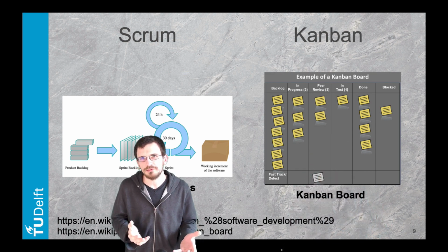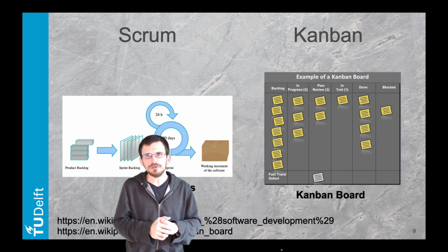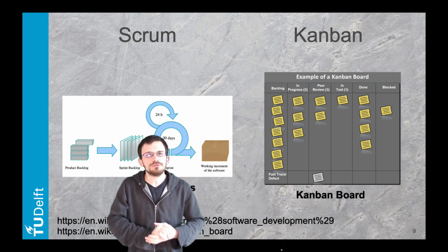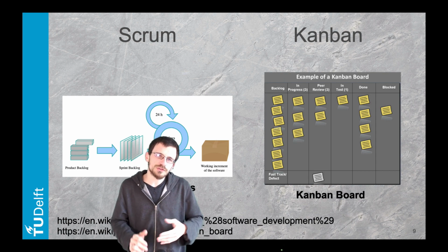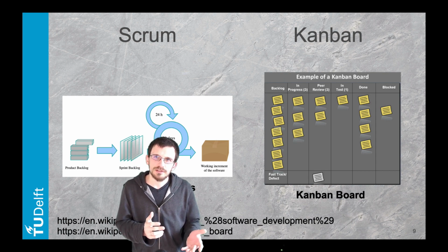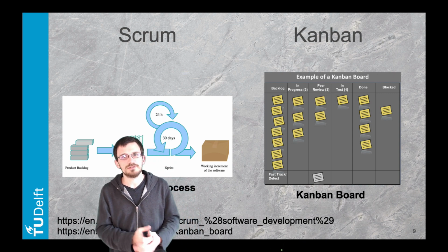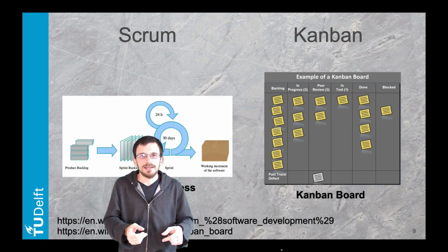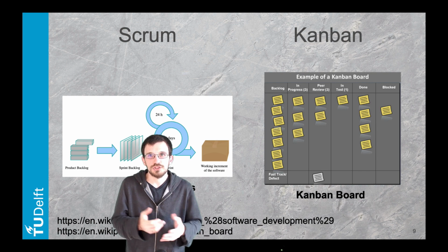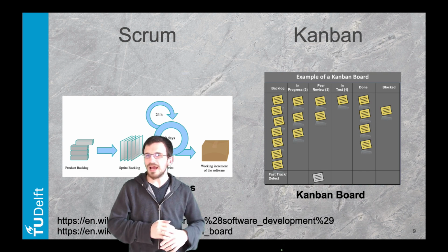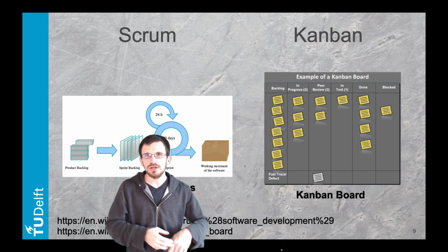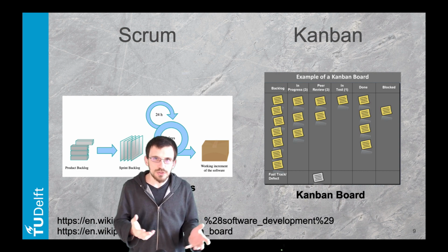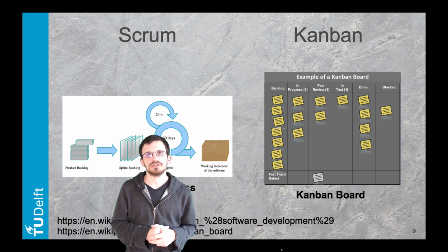Kanban is another method originating from manufacturing with a popular board visual. We got a glimpse of that board in our discussion with cars. In contrast with Scrum iterations, Kanban is event driven. A change in plan can occur at any time, and the team can add tasks to the Kanban board as long as there is capacity for it.